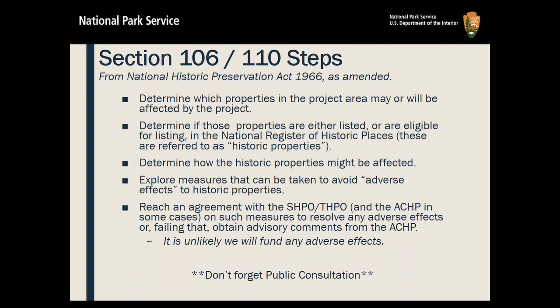Then we have to decide how would that historic property be affected by your project. And should there be any likely adverse effects, we'd have to look at ways we could take to avoid them. We in this division do not like to fund anything that's an adverse effect, and in fact we shouldn't. So we'd like to reach an agreement with the State Historic Preservation Office or the Tribal Historic Preservation Office, as well as the Advisory Council in some cases, to reach a measure to resolve an adverse effect. It is very unlikely we'll fund any such thing. We're going to talk about public consultation in a section.